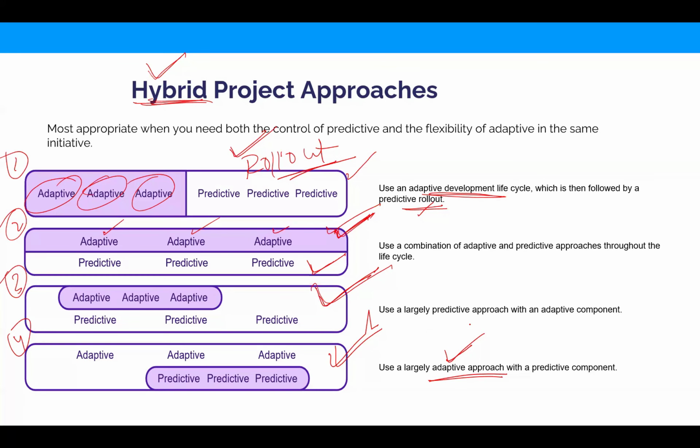But there's one portion in the project, let me show you, for which the requirement is 100% detailed. No evolution would happen. You know what? Which one? The insurance premium calculator. And for building this premium calculator, we have 100% hard-coded logic available. There'll be no evolution here. 100% detailed requirement we have for that. So why use Agile for that? Build that premium calculator using predictive. So that's like, again, another example of hybrid where it is mostly Agile with a small predictive component.